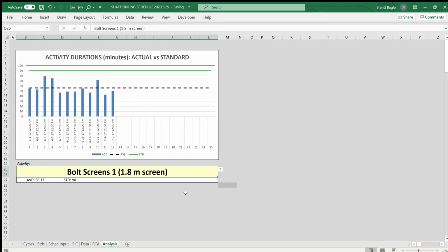So the benefits of this analysis tool are, firstly, it helps maintain realistic standards for the tool, and if we're able to do that, then our schedules are likely to be more accurate and reliable. And secondly, it identifies opportunities for improvement. We identify activities where there are root causes which can be eliminated. We can reduce those, and thereby reduce the activity durations, and collectively reduce the overall project duration, which will increase the profitability of the project.